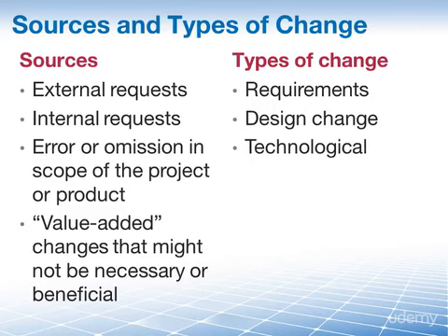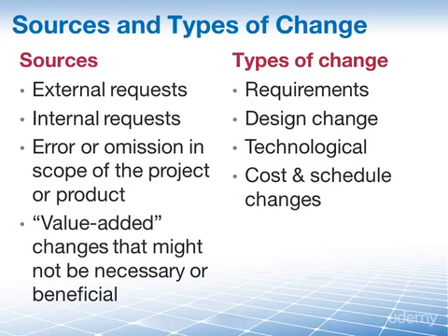This can be beneficial or detrimental to the project. For example, a change in software programs from one language to another because of an increase in flexibility or adherence to a new standard. There could be cost and schedule changes. These can occur over time due to a rise in commodity costs or a shortage of qualified staff.